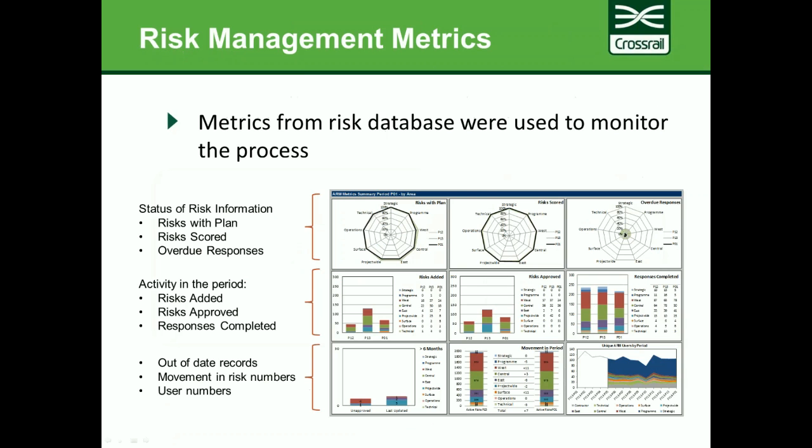And then also, as I've already alluded to, we made quite extensive use of the data held in Active Risk Manager to monitor performance in risk management across the organisation. It's important to note that managing the database is not managing risk, but it gave us a very good indicator of the performance of risk management across the organisation.